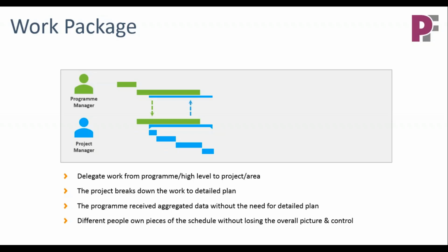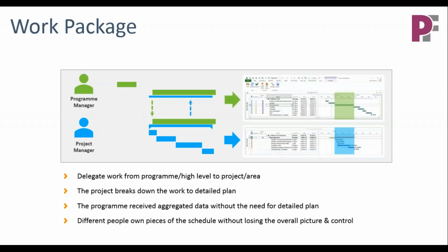And I will then, from there on, continue to receive all the aggregated information on that scope, and I can choose again to accept and align. And in the project itself, in my work plan, in the higher level, it will just be this one line, but in the underlying plan, it will be the entire work plan as detailed as needs to be.